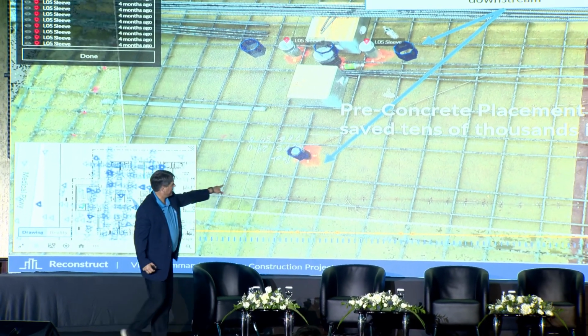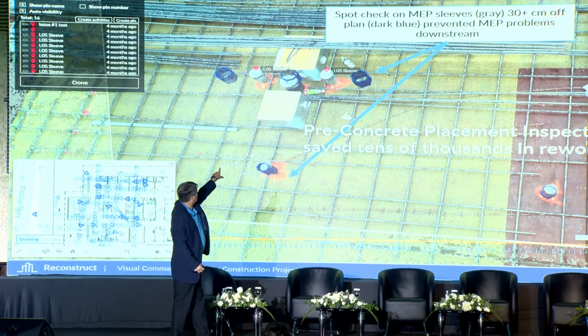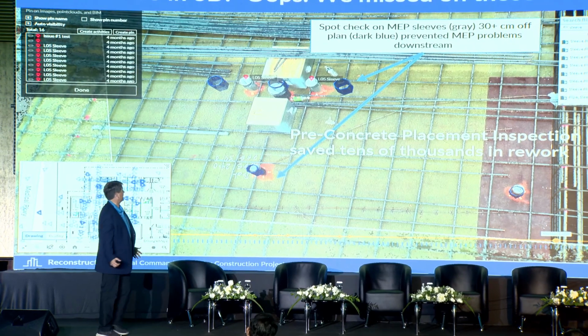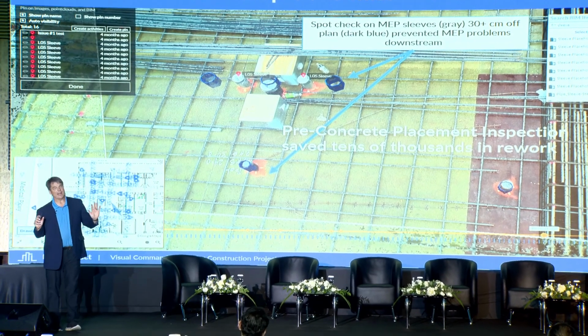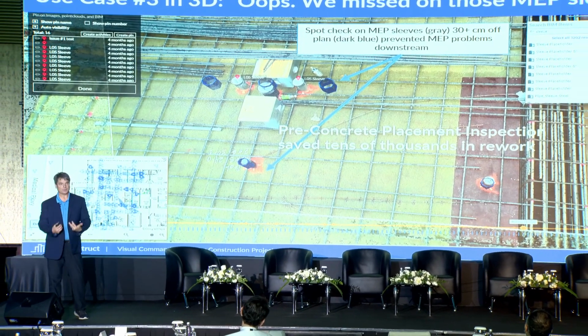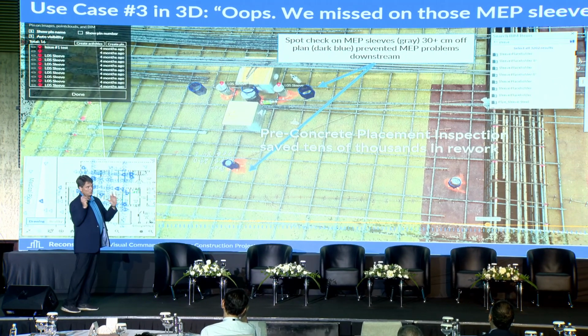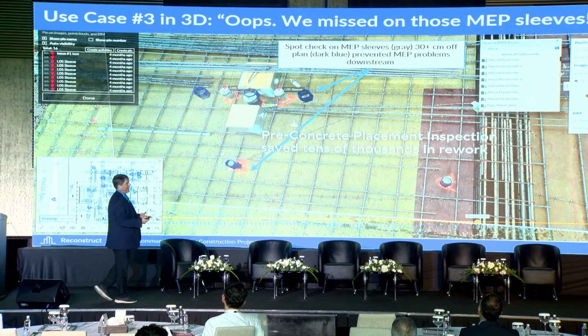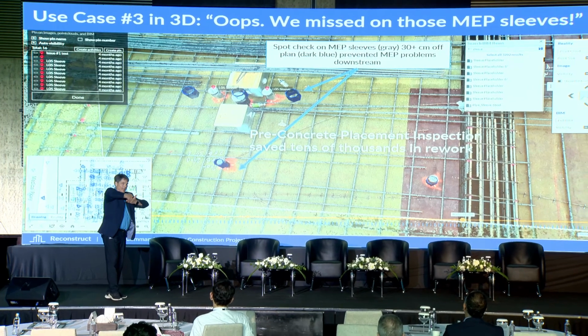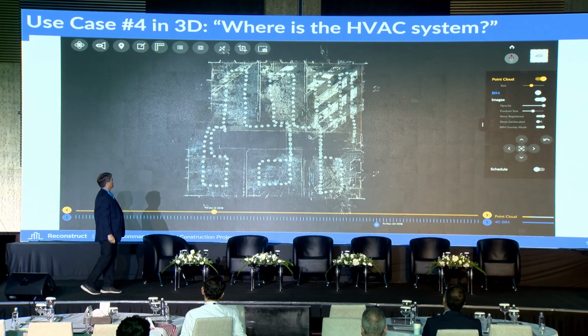That one's in place, that one's at spec. The others here are probably a good meter and a half away. Not great, because you're going to have pipes and electrical, and you're going to have to get the jackhammers out. So very, very simple, quick example of the value add of doing a design overlay on top of reality.